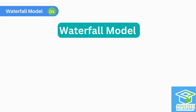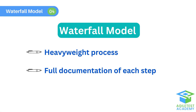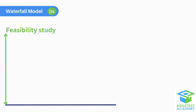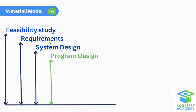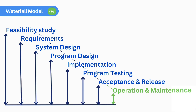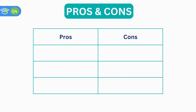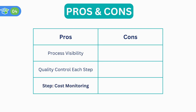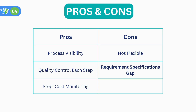Waterfall model is a heavyweight process with full documentation of each process step. In practice, each stage in the process reveals new understanding of the previous stages, so it requires an early stage to be revised. Furthermore, the development team cannot create a proposed budget and schedule without a preliminary study of the requirements and tentative design. In reality, the waterfall model has many problems, so it is rarely used in practice. It provides process visibility, quality control, and cost monitoring at each step, but it is not flexible enough. Detailed design and implementation reveal gaps in requirements specification, so the requirements may be modified during the project development.